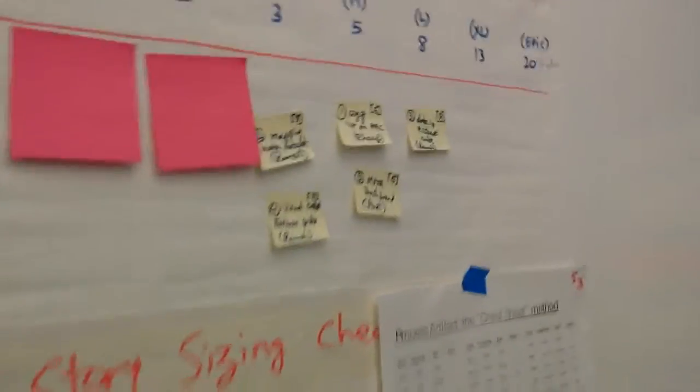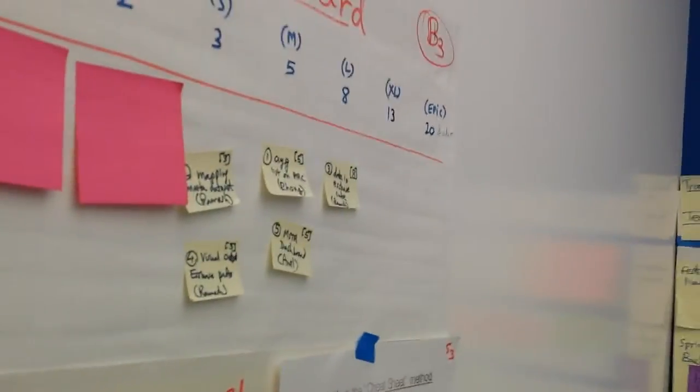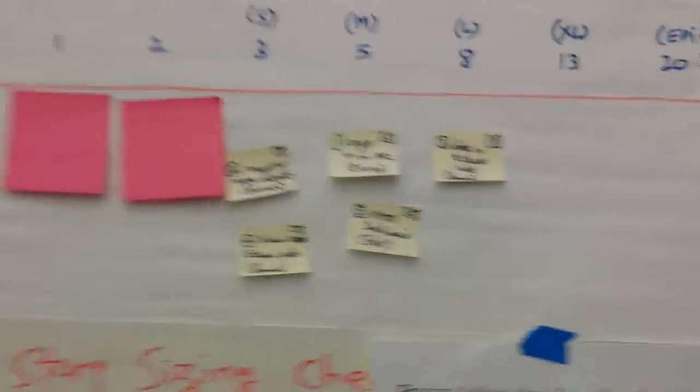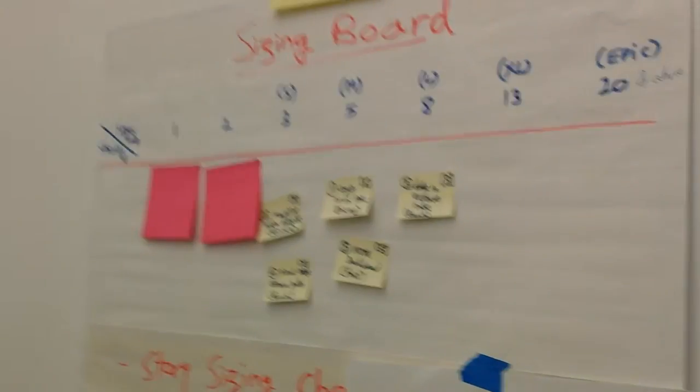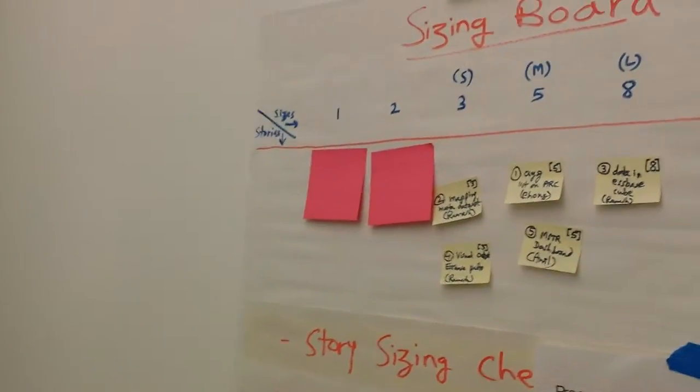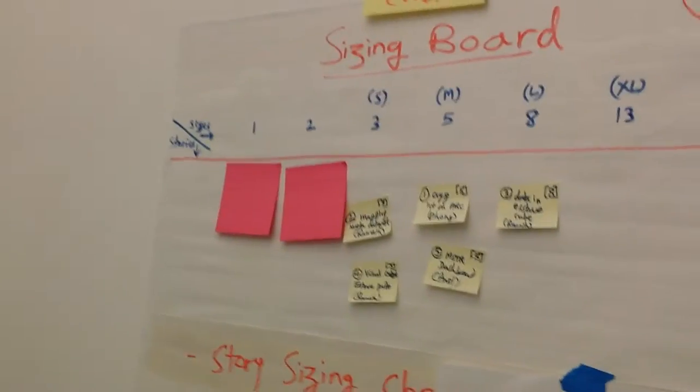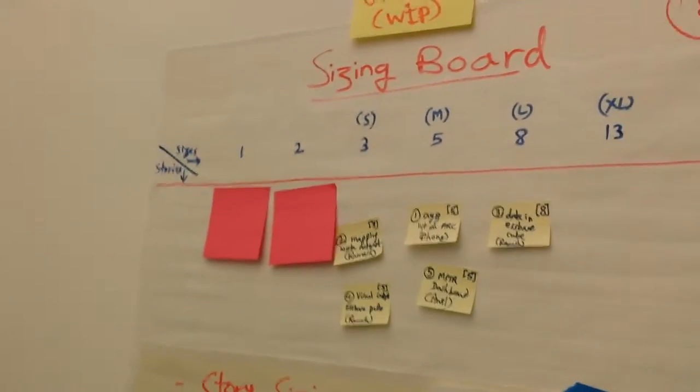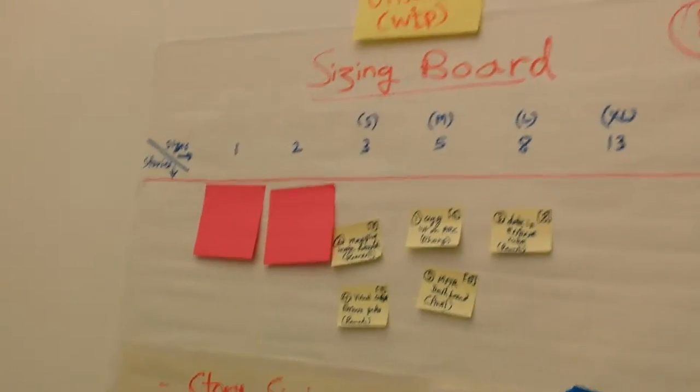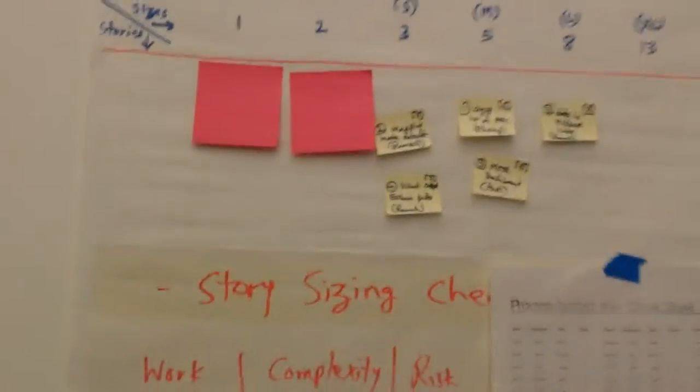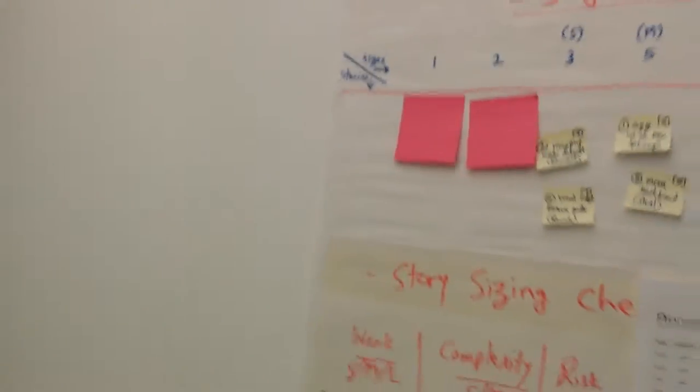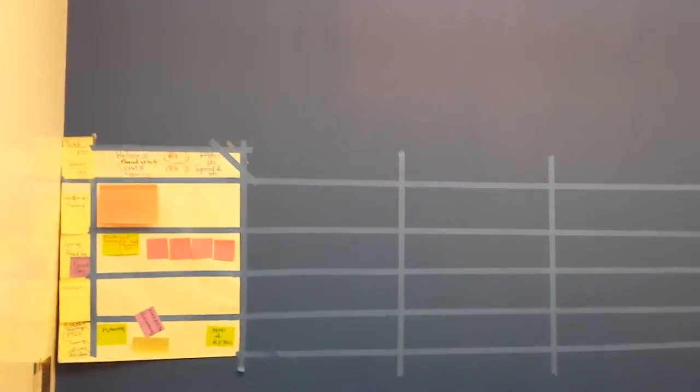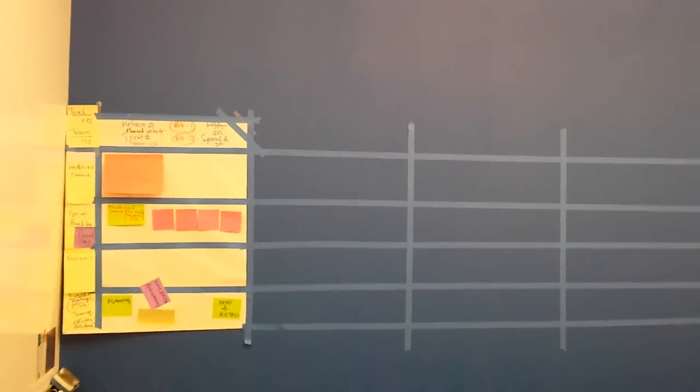They come back and decide what they can do with that get. If there's a give involved, they should be doing the same thing, except they would go to the team that is dependent on our team. Once you're done with your gives and gets and loading the stories into Rally, we're ready to plan for the sprint.